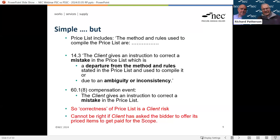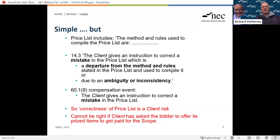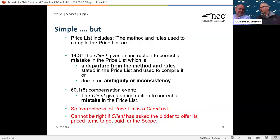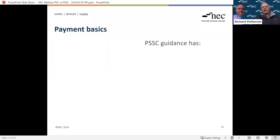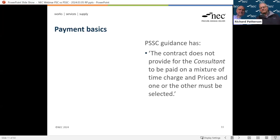If the client wants a lump sum it's totally normal to let the consultant write out their own price list. But even if the consultant does that, these clauses are still in the contract. Barry and I have discussed this at length and agreed that if that is the case, it can't be right for the client to have the risk of the correctness of the price list. The only way to sort that out is to delete those two clauses if you don't want the client to carry the risk of mistakes or ambiguities in the price list.